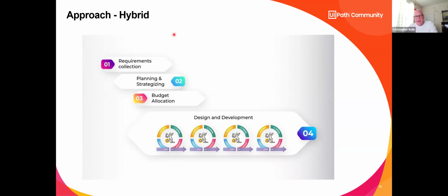When you're working with the client, you adapt to what their system is. And if you're setting it up on your own, determine, based on the type of projects you have, what's the best approach. You don't have to use waterfall for everything. You don't have to use agile for everything. You don't have to use a hybrid for everything. You can use agile, waterfall on some. You can use agile on others. And commonly in some organizations, when we have a large cross-functional automation, the large one will be waterfall, and then different components within their different projects in that program will be agile.